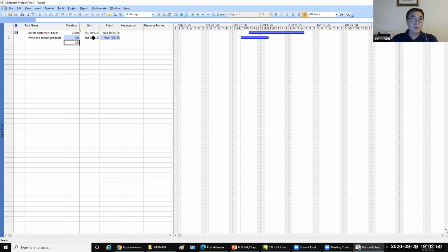And then here we need the predecessor information that is from A. So in this program, it is not ABC, it is the number. So 1 after 1. So after activity A, or 1, the next one starts. And the third activity is obtain approval.